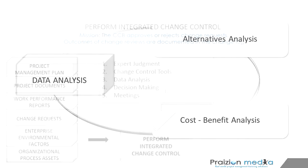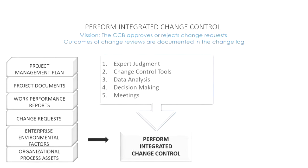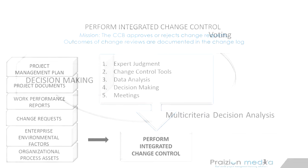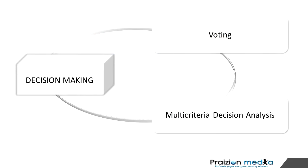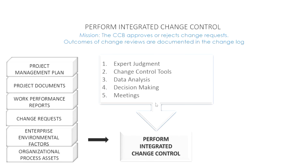Next we have decision making — making decisions in the change control board. There are all sorts of ways this could be done. The two broad categories are: voting on whether to approve a change request, or multi-criteria decision analysis, which looks at various criteria for agreeing that a change should be made. All these criteria should be defined up front, and the change control board is of course aware of them. The final tool and technique is meetings — change control meetings are the vehicle by which change requests get approved.